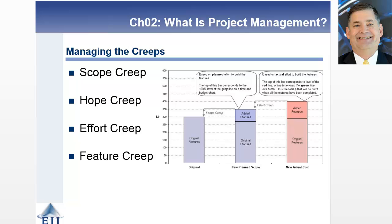Hope creep is when a project team member falls behind schedule but reports that he or she is on schedule, hoping to get back on schedule by the next report date. Hope creep captures those project team members who are hoping to catch back up. How do you fall behind? You do it one day at a time — and that's exactly what hope creep represents.